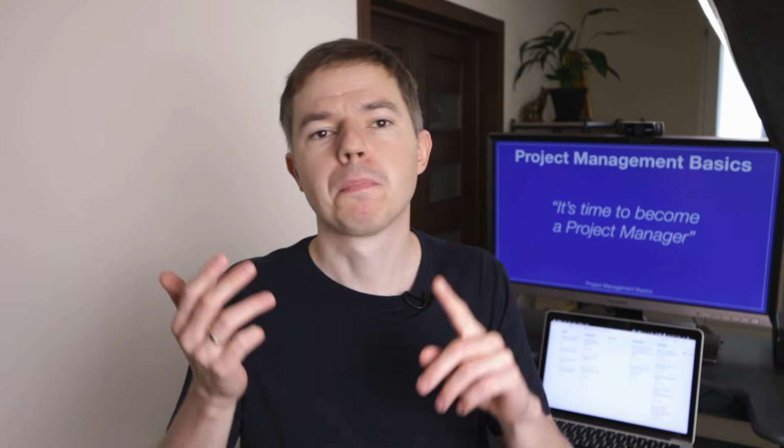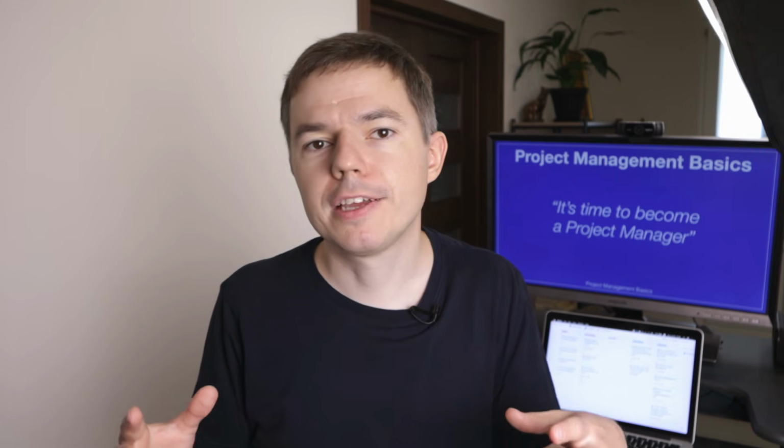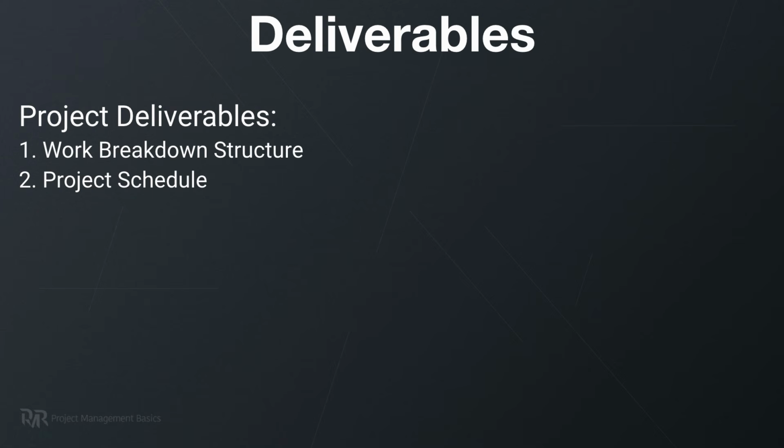Deliverables. It is the description of all deliverables your project will produce. It may include the product or service, project documentation, product manuals, educational materials for your product, and so on. So put all tangible and intangible results that you need to hand off to the client at the end of your project. So in our example, the client wants to get some project management deliverables like work breakdown structure and project schedule. And product deliverables.